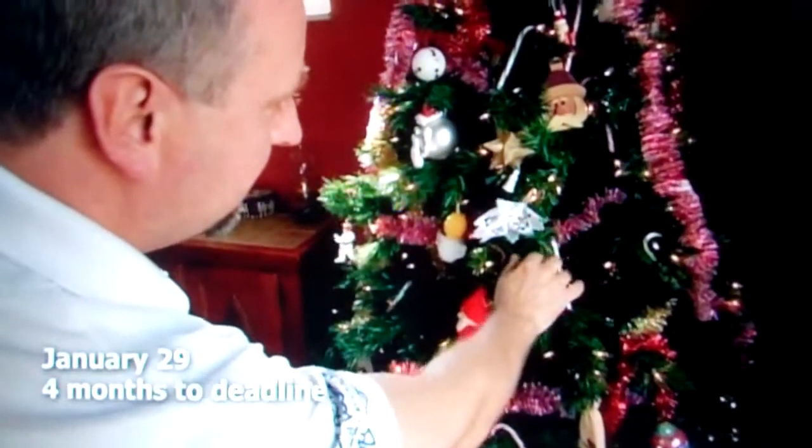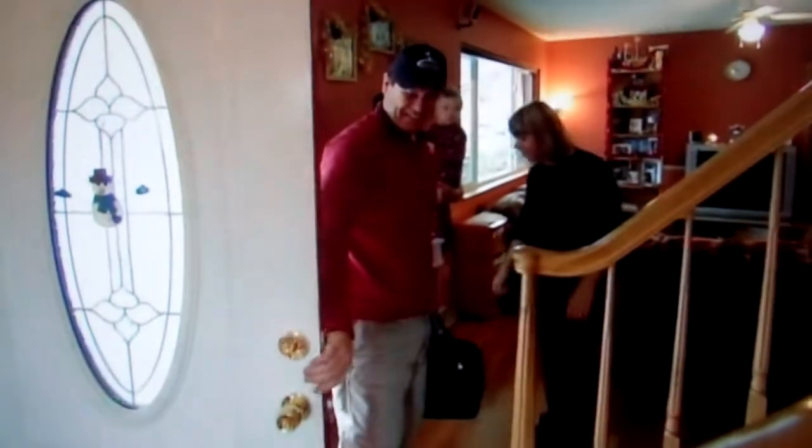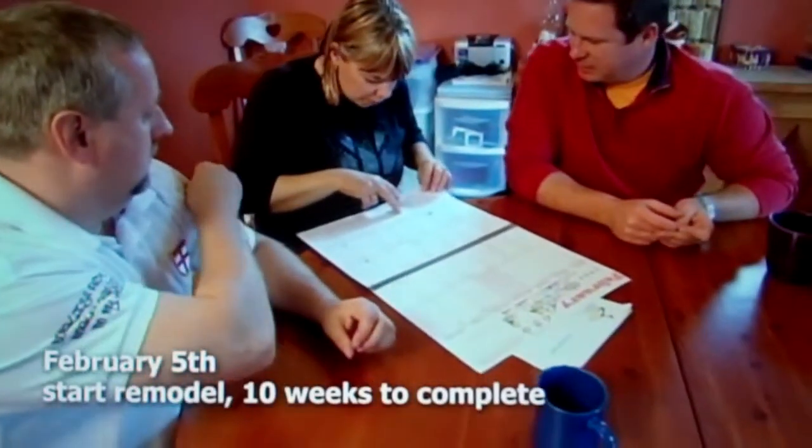The holiday season is over, and Todd's here to review the start dates for the remodel and staging. I had down as a start date of February 27th. That's probably a little too late. How long do you think that the build-out's going to take? I think 10 weeks is probably very safe. I just hope that you guys will have this house priced right to sell. As long as it's sold by the end of May, and then we leave. With the move-out day of May 30th, Todd agrees to start renovations the following Monday.